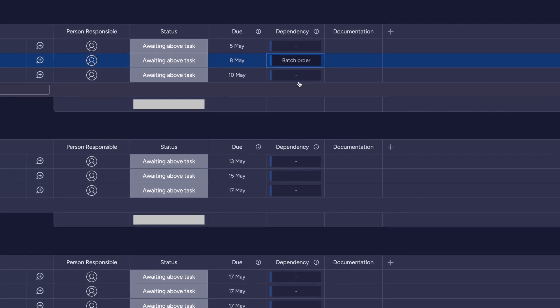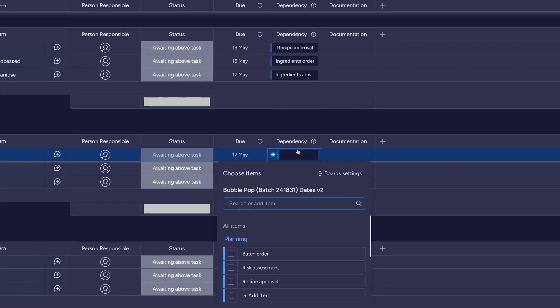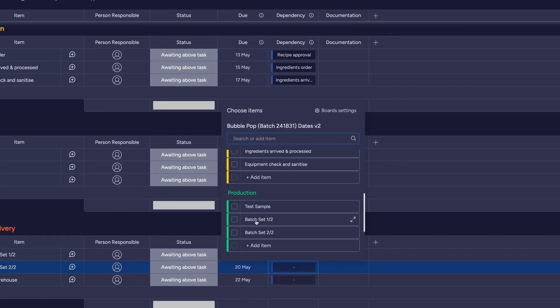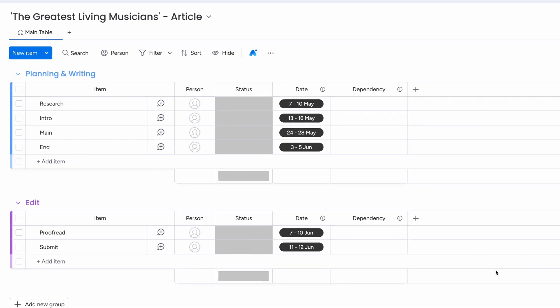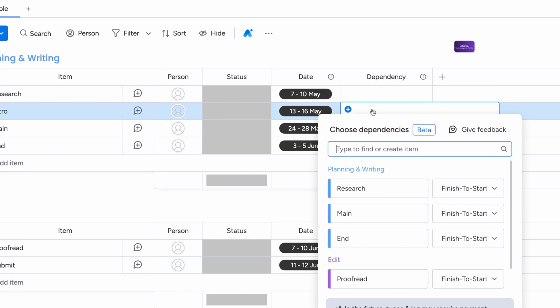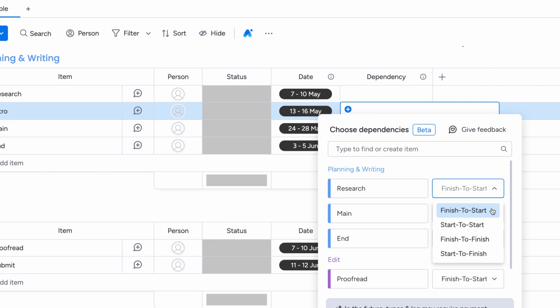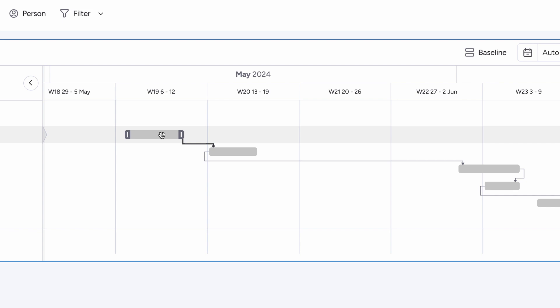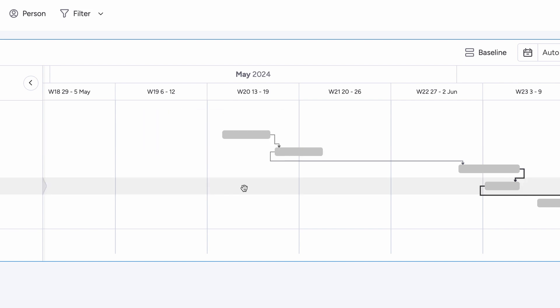Once you've picked the column that represents the date for the dependency, you can start to label them in your process. Click on the child item's dependency column and choose the parent that you want this child item to be dependent on. Now you'll have the choice to lag the dependency — this is how Monday.com ties the two dates together and responds to changes in the dates in the timeline. By default, Monday.com sets it for finish to start, which means that the dates will shift in the child item if the end date of the parent item passes its start date.